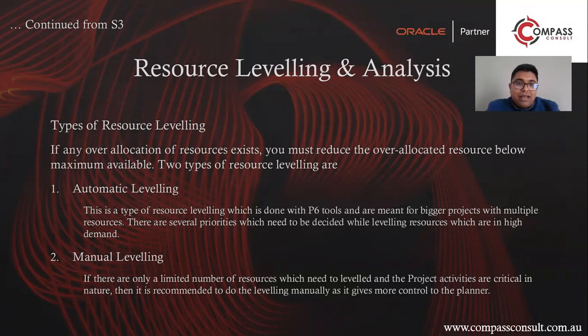What happens in real life is, when there is a tight requirement of labor, the project manager and the construction manager, everybody is rushing to get labor from anywhere. That's what I have seen. And at that point in time, when labor is required in the next 1 month in order to produce results, even a helper becomes a mason, and a fitter helper becomes a fitter, and we get deteriorated quality of people because we didn't plan for it. And now there's a demand and there's an upsurge, and everything goes wrong.